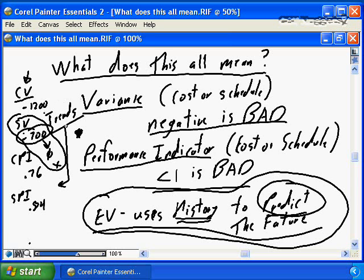Look for your trends. Look for the improvement in your project picture. And with those improvements, you're going to see the project is not going to be delivered 7.1 months late. The next month into the project, it's only going to be delivering 6.8 months over, and so on as you trend backwards to the plan. Earned value is a tool in your toolkit. It's a very important, very powerful tool, but it can't be taken in isolation.